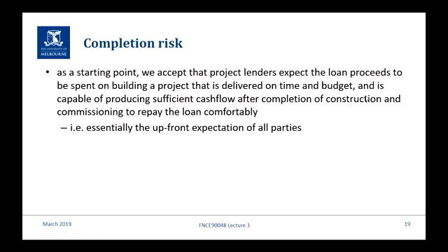and everyone agrees that once we've finished construction, then it's going to produce the cash flows that have been forecast. Now, no one's naive enough to think it's going to produce to the dollar, but everyone thinks that's a reasonable estimate, that's the best estimate, and in most cases the lenders and the sponsors like to have it slightly conservative. We're going to commit to producing 20,000 barrels a month. We think, or a week, or a day, whatever it is, a day probably. We think we can actually do 30, but let's commit to 25 for the purposes of the project budget. So once it's happening, it'll repay the loan comfortably.